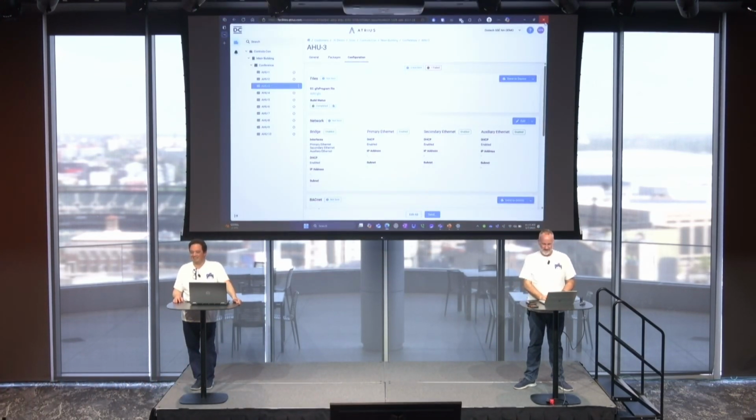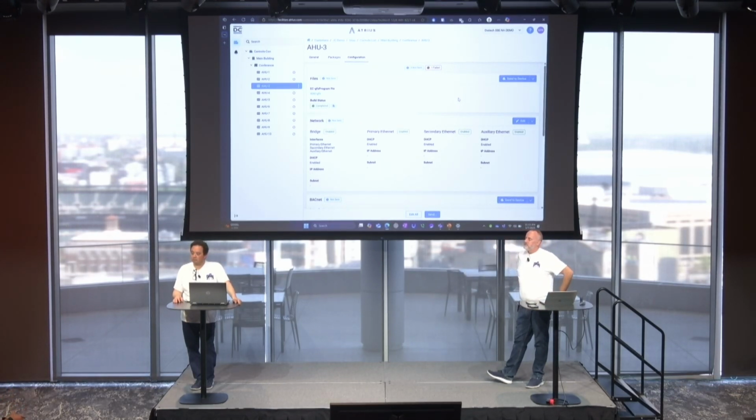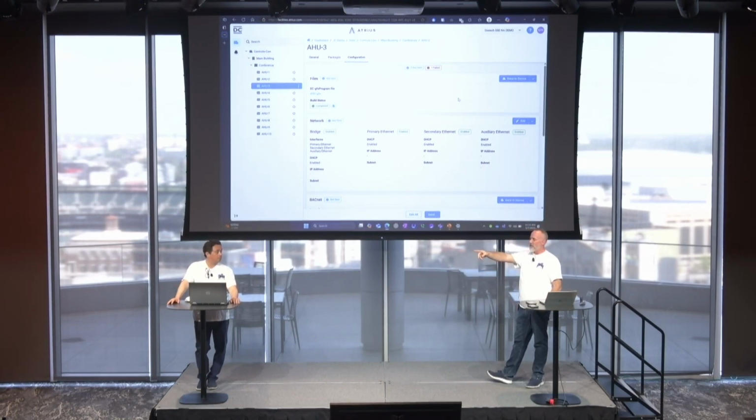Just kidding. So this whole setup here is, I think, super cool, but in a situation where a customer doesn't want you to have a connection like that, and you just want to use this for initial setup, is that a use case you guys would do? Yeah, if a customer wasn't going to give you that outbound access, on startup of commissioning, the network is never ready to go. I have a little portable cell router back there, but I have no signal, so we made some other assessments for it. Something like that would work for a tech on site for a period of time.